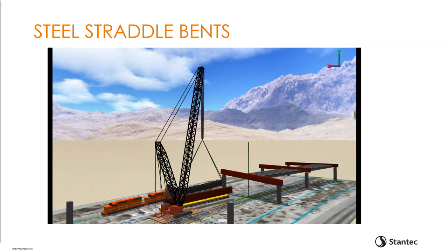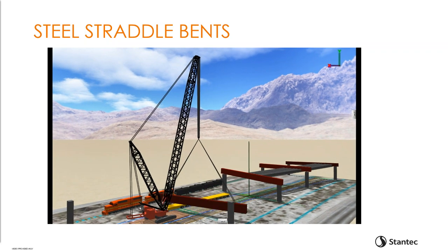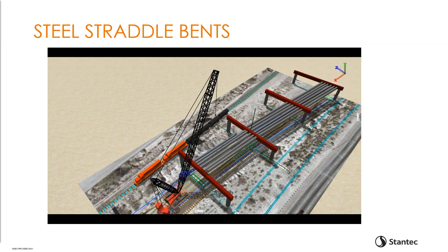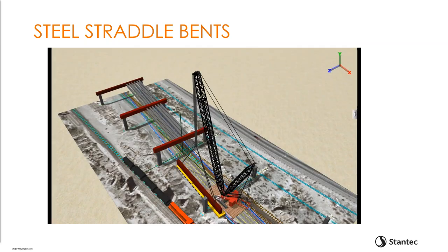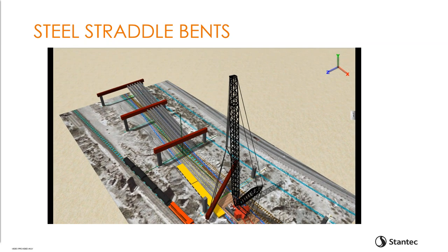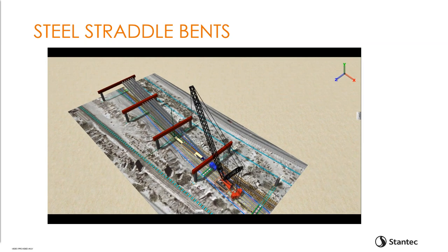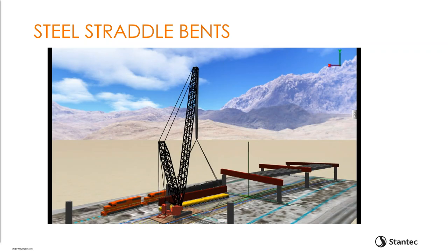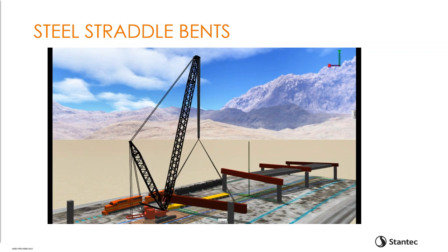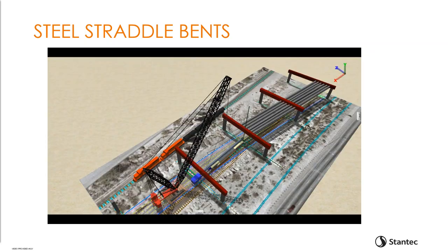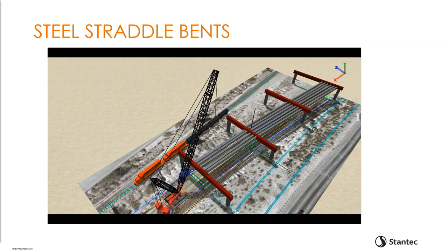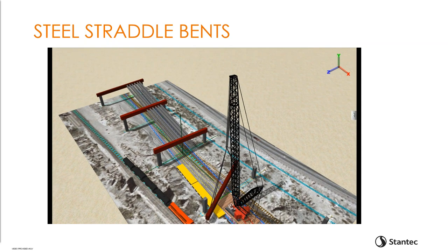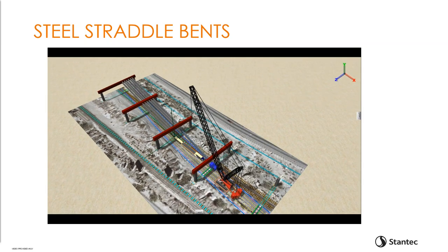As there were no issues during construction, they developed this 3D model of the straddle bend from our construction documents. This model was created to verify and show the alternate sequence from steel cap to pre-stress girders in the same shift, how the contractors can squeeze the crane and trucks within their access corridor perfectly placed between the 3 tracks, crane capacities and all clearances at all stages of construction, and stability from overturning from girders placed on one side. Also, the construction window from the railroad was just 4 hours during the whole construction of the straddle bend, which was very tight.